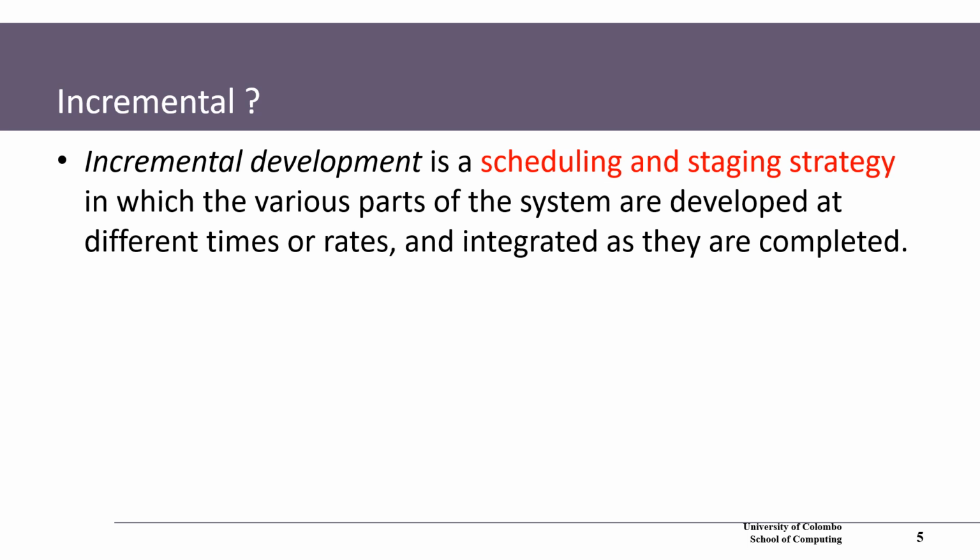You may remember that. You don't want to wait until one part finishes. That's very important to minimize the time taken as well as maximize resource usage, in which various parts of the system are developed at different times or rates and integrated as they are completed. Okay.